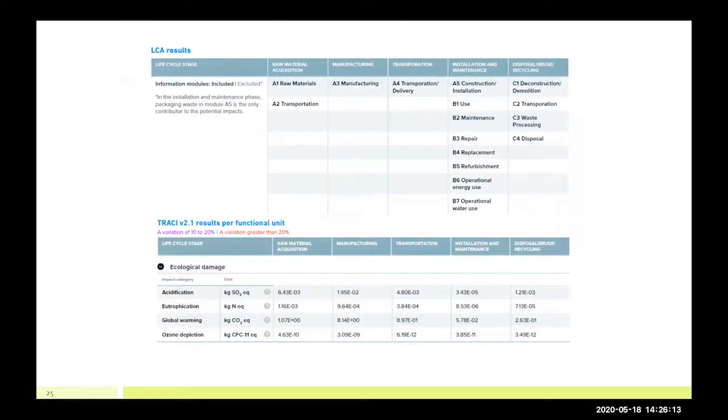So now that you've gone through all of that information and it's time to compare the GWP values to see whether or not this material meets the Buy Clean California Act, you come up to this obstacle where the values are not aggregated as in the new core steel example. So what you need to do is scroll through the transparency report and find out which information modules are included in which section.